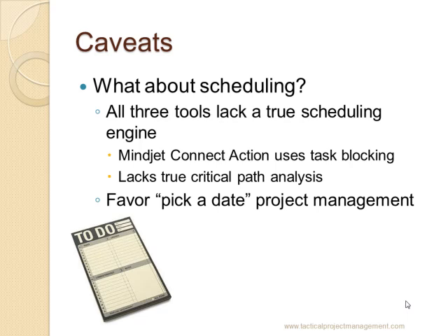And by predictive, you mean we have 20 tasks in one of these tools, and if you put all these tasks after each other and each takes a day, it takes 20 days to complete, so our project will end on July 20th. Correct. We were actually building tasks with finish-to-start dependencies. Right. Dependencies, and where that relationship is recognized. Okay. Yeah.